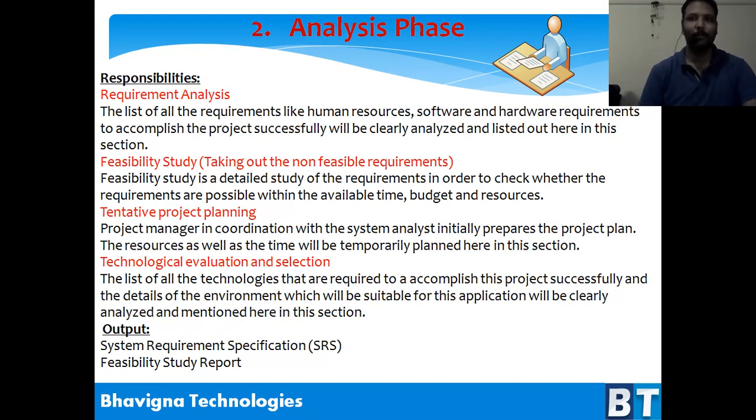If you know what we have to do, and what we are getting from the outside, and what you are going to reuse, then depending on that, tentative, high level planning will be done. You know that plans will not be baselined. Plans will be controlled and managed, so every time plans will be changing.